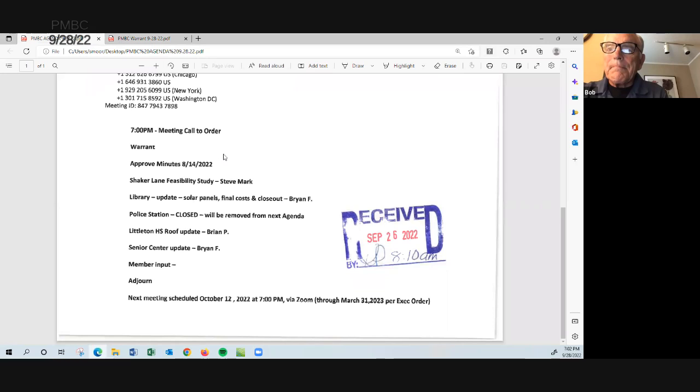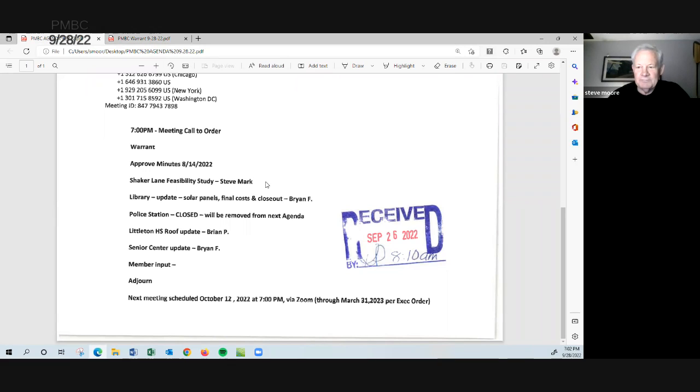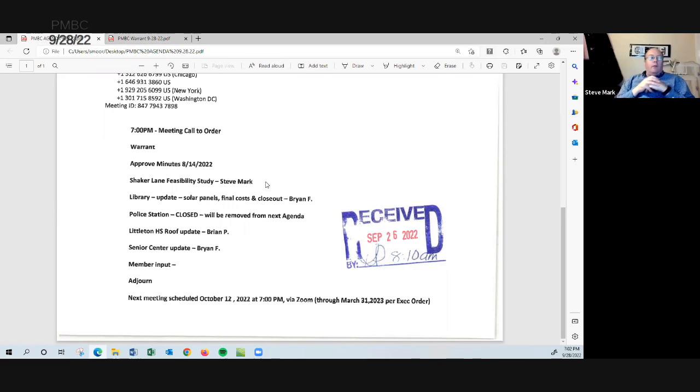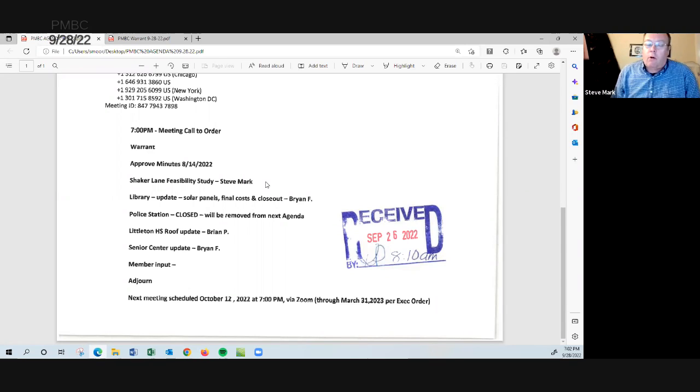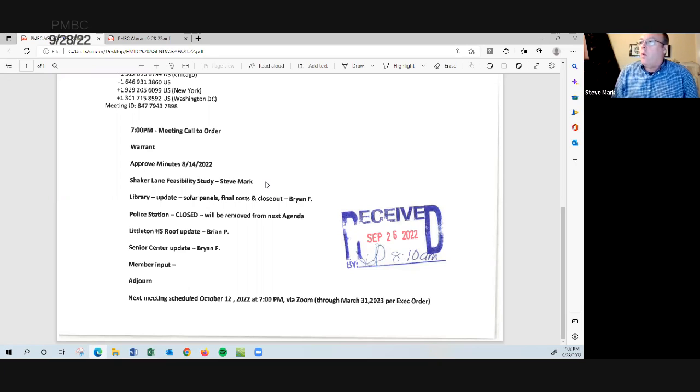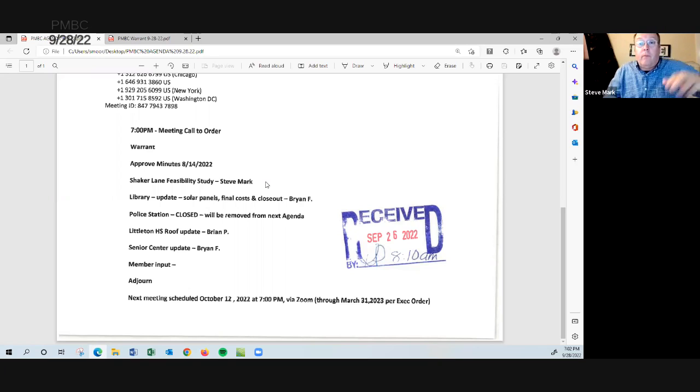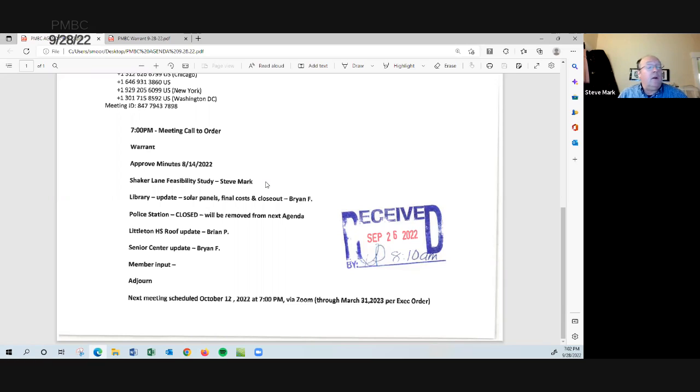We need a quorum. Yes. So we'll move on to the library update or the Shaker Lane feasibility study and let Steve Mark talk to that. Hi. Good evening. Thanks for having me. Where do I start? So we are, Shaker Lane with MSBA is in what they consider phase one, the eligibility period. There's a list of deliverables that we've been working on, a compliance certificate. The building committee, as you know, is formed and approved.